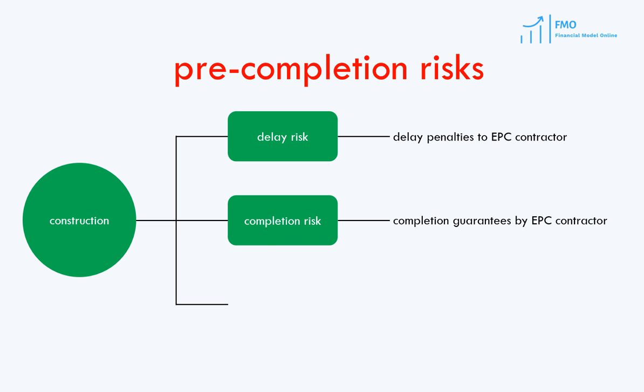Another important risk at construction is completion risk — will the project be built at all? Again, this is dealt with through an EPC contract, whereby the EPC contractor provides a completion guarantee, typically backed by an independent bank. Finally, the performance of the project once construction is complete is also a risk that EPC is responsible for. The project has to perform at least as well as specified in the EPC contract. If performance is worse than the specifications, the project will not be able to produce planned output and generate planned cash flows, negatively affecting its ability to repay debt and pay dividends. Therefore, it is customary to have performance guarantees in the EPC contract.